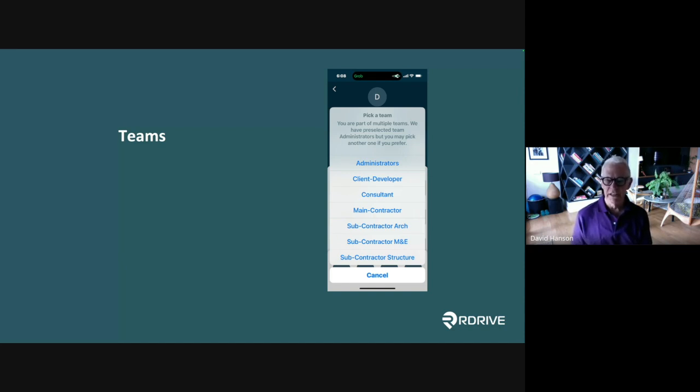And so if you're seeing that issues have been assigned by you to the subcontractor, and the subcontractor isn't taking action on it, one, you can comment, send them a note, and two, let's say the subcontractor tells you he's fixed that issue. You can go in as the subcontractor team and mark it as being fixed rather than wait for him to get back from sick leave. Okay.